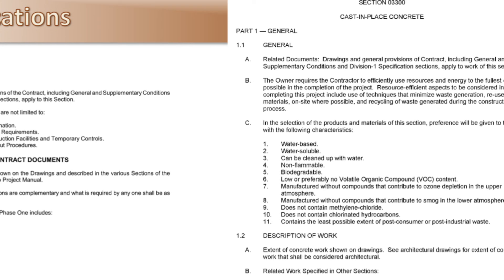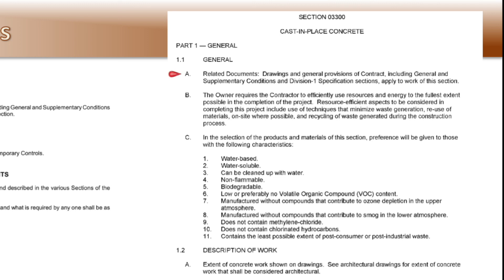Another example — Part 1, General, A. Related Documents: 'Drawings and general provisions of the contract, including general and supplementary conditions and Division I specification sections, apply to the work in this section.' So everything in Division I now applies to this section. It goes on to say the owner requires the contractor to efficiently use resources and energy to the fullest extent possible. Resource-efficient aspects to be considered include use of techniques that minimize waste generation, reuse of materials on-site where possible, and recycling of waste generated during the construction process.